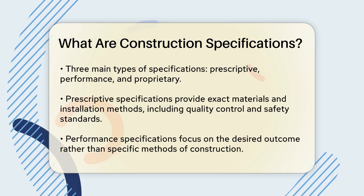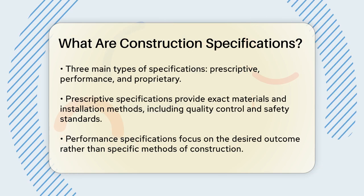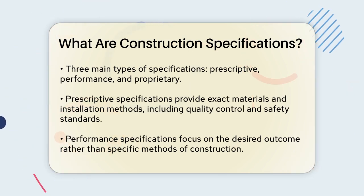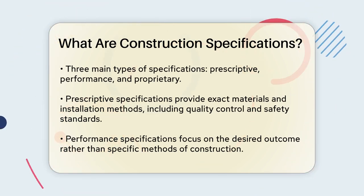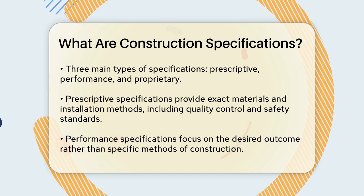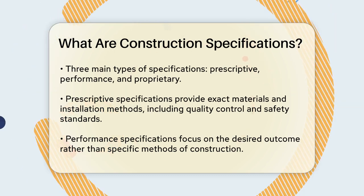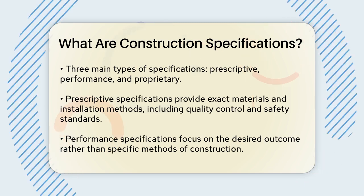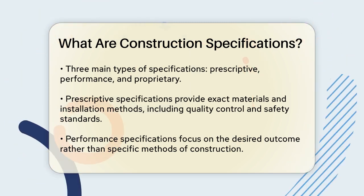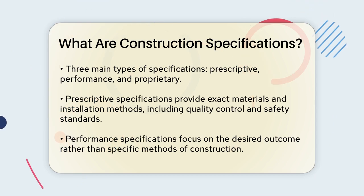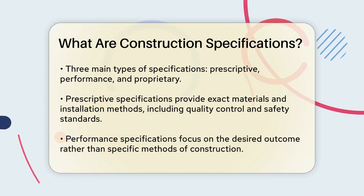There are three main types of construction specifications: prescriptive, performance, and proprietary. Prescriptive specifications are very detailed, telling contractors exactly which materials to use and how to install them. For example, they might specify the type of concrete to use, how to mix it, and how to lay it down. These specs also include information on quality control, testing requirements, and safety standards.